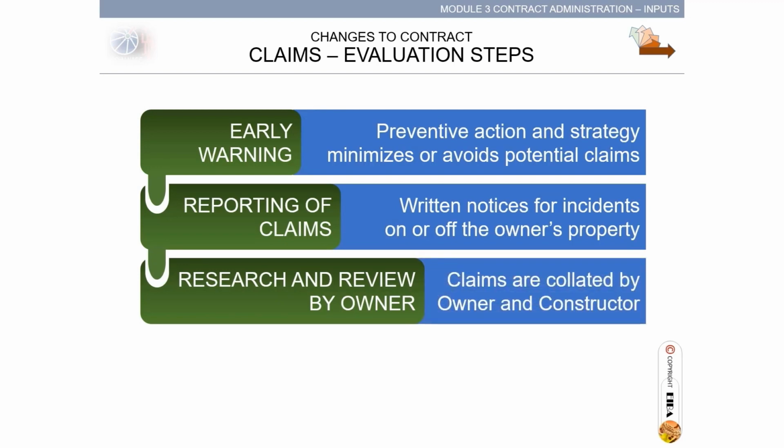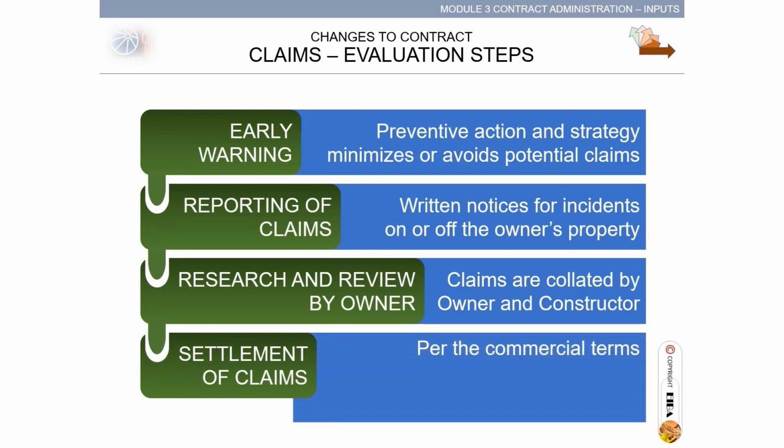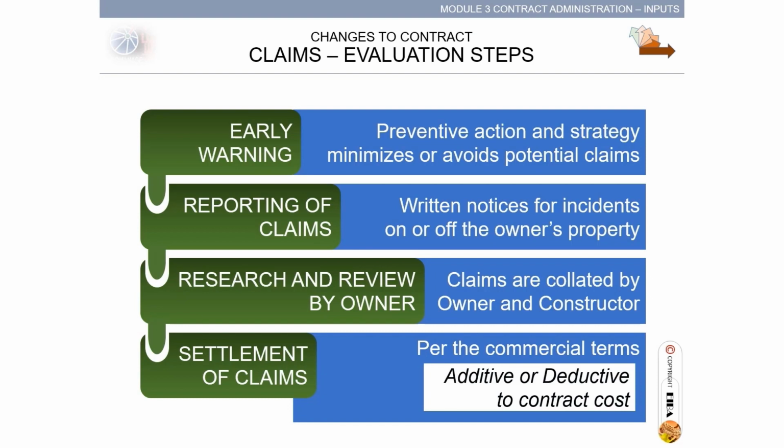Claims are collated by owner and constructor. Settlement of claims per the commercial terms. The claims can be additive or deductive to contract cost. These steps would appear easy, but when costs are involved, there will be tough negotiations between the parties to agree to the claims proposal. Evaluation of delay claims.